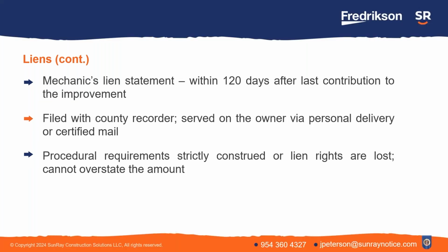All right, now you've done your pre-lien notice, you do your work, you send your final statement, your final pay application, you find out you're not getting paid for some reason, there's some dispute, you're at the tail end of the project now. Now what do you have to do? We need to make sure you have your mechanics lien statement filed. And this is the same for everyone, contractor, subcontractor, material supplier. Now the rules are the same.